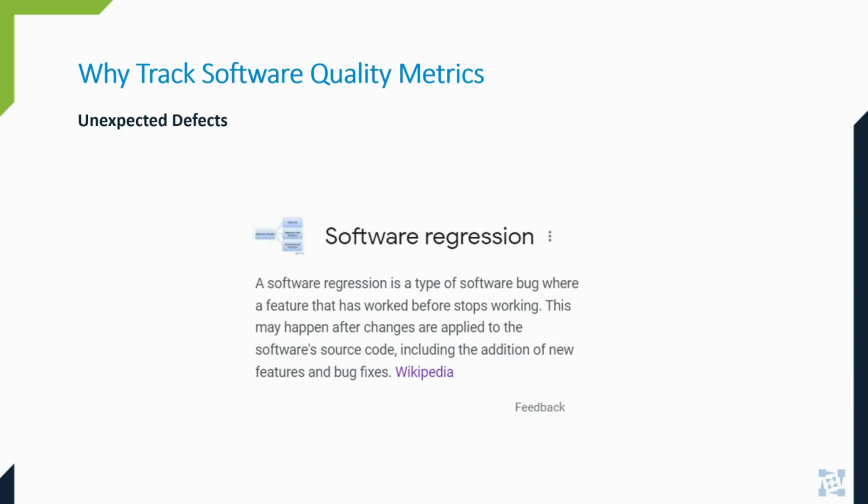And while it should be expected, expect the unexpected, as they say, it can have detrimental effects on a team's ability to deliver what they've committed to because they're getting distracted by addressing quality issues while they're trying to implement new functionality. And with shorter development iterations compressing the time window, and higher levels of DevOps automation pushing velocity higher, the impact of frequent regressions gets amplified. It can dramatically influence the predictability of your software releases, and predictability is really important when you're trying to run a business.